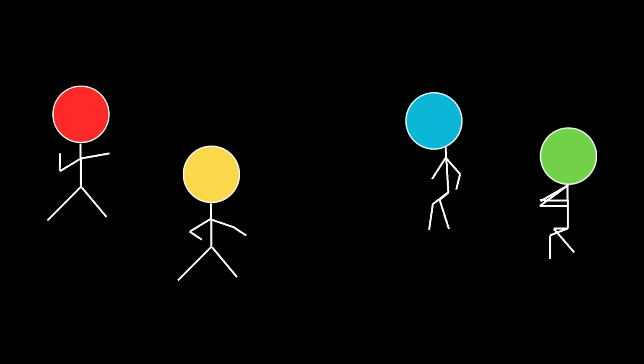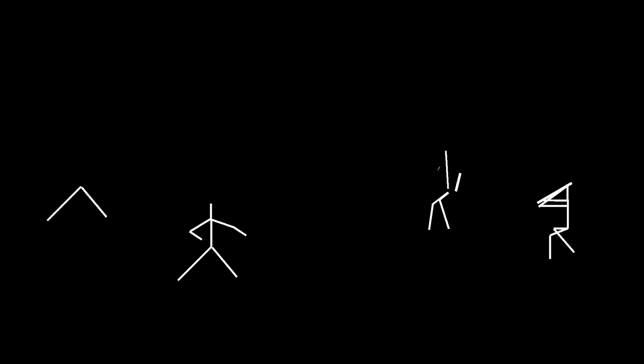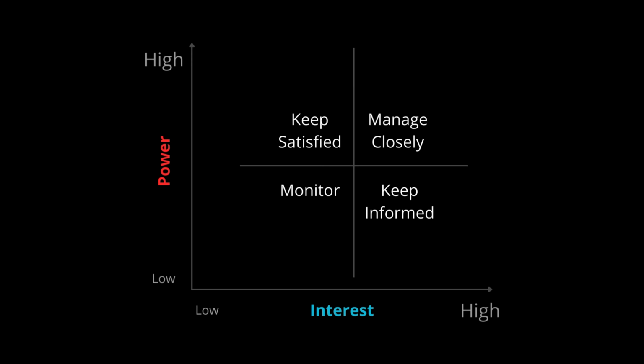Well, I hope you got an idea of the 4 types of behavior. Maybe you were able to connect them to specific people. You will be able to use the DISC colors well as a supplement to the classic stakeholder analysis. In the classic stakeholder analysis, the stakeholders are first classified according to power, ability, influence, and interest, commitment to the project. You then record the treatment strategy for each: keep satisfied, manage closely, monitor, keep informed. So this is the strategic part.